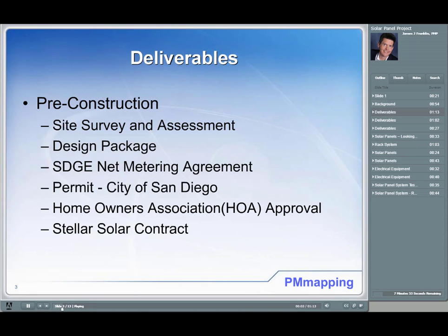Some of the key deliverables for the pre-construction phase are site survey and assessment. We first had to evaluate the roof, determine how many panels, and assess the monthly utility usage — that would be input into the design package. The design package included drawings, a plan view, electrical drawings, structural drawings, product data sheets for the panels, and which microinverter we were going to use. We also had to prepare, via the web, the net metering agreement — the agreement with San Diego Gas & Electric where we could return generated power back into the grid.